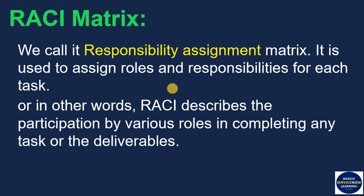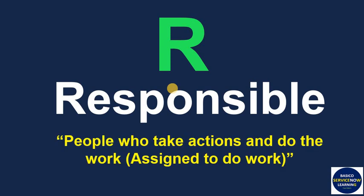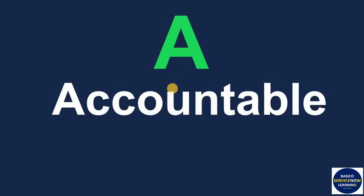The first letter R stands for Responsible. In the RACI matrix, we give R to those people who take action and do the work — in short, those assigned to do the work. For example, a tester is creating the test case, so he is Responsible. We give R to the tester.